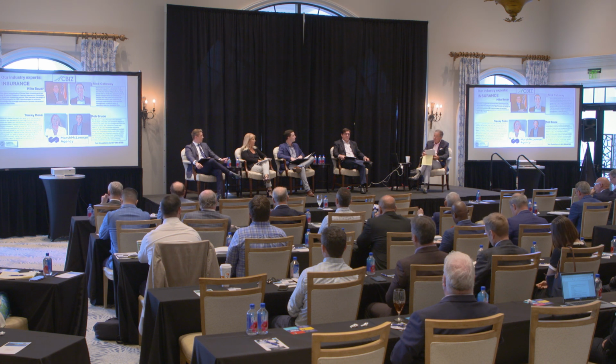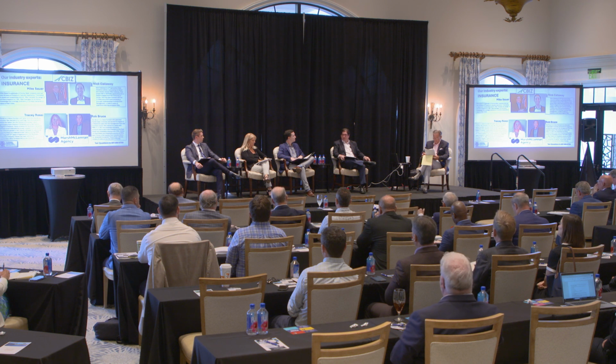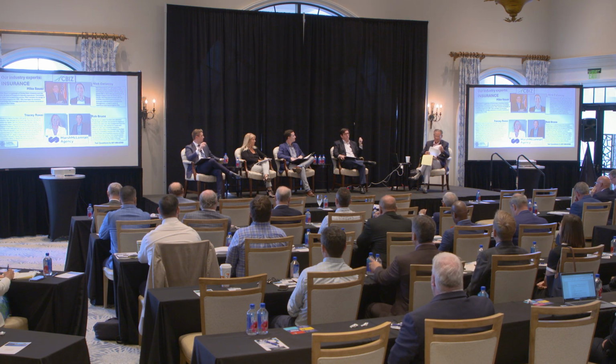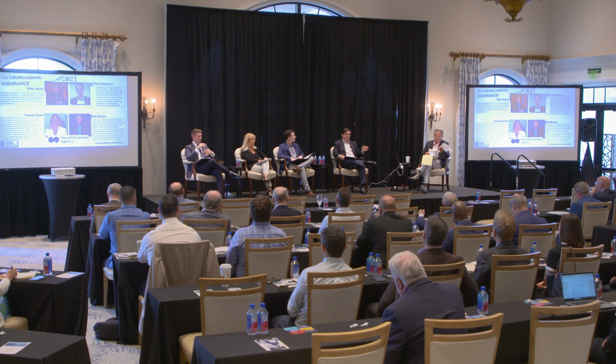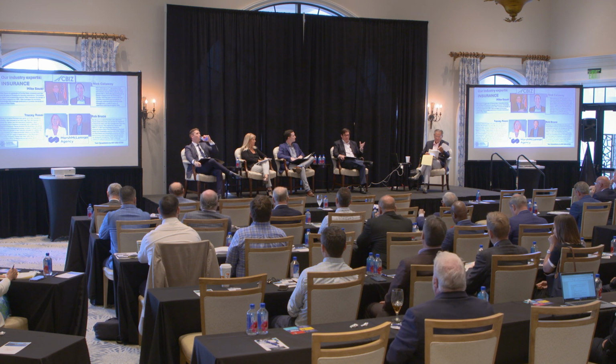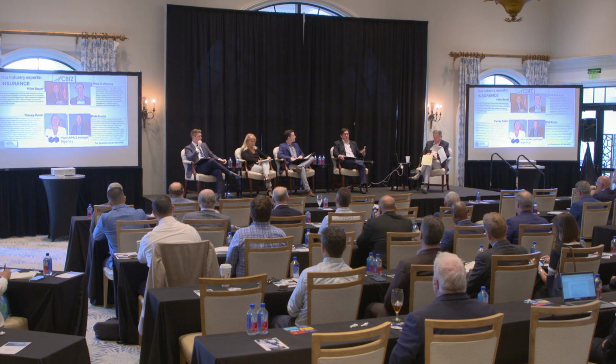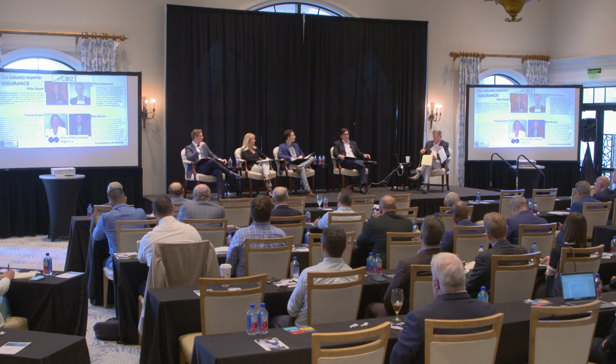Yeah, I would add that, and this is something that I think we'd all agree on, a lot of times we hear we have a certificate of insurance that says we're additional insured, but if it's not on the contract, you're not. Because per the policy language, you're only additional insured by written contract. So I can't tell you how many calls I've received from different clubs and other types of clients that have said, oh, we're fine, we're additional insured. Well, if we don't have it in writing and we don't have a signature on that, that's not the case. So just be careful with that kind of stuff.